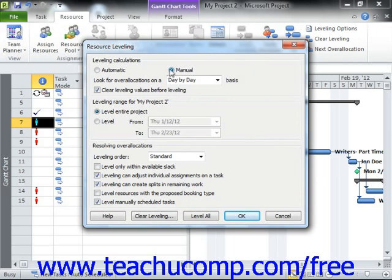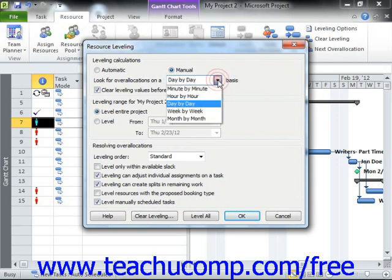Next, use the Look for Over Allocations On dropdown to select the basis to be used for resource over-allocation examination. Note that choosing a level of inspection that is finer than a day-by-day basis may result in many unnecessary adjustments to the work schedule, so use care if selecting a level of inspection that is finer than the day-by-day basis.